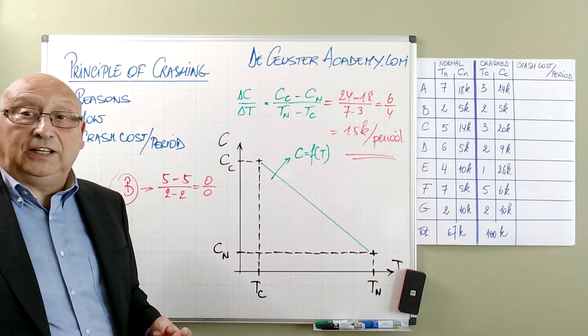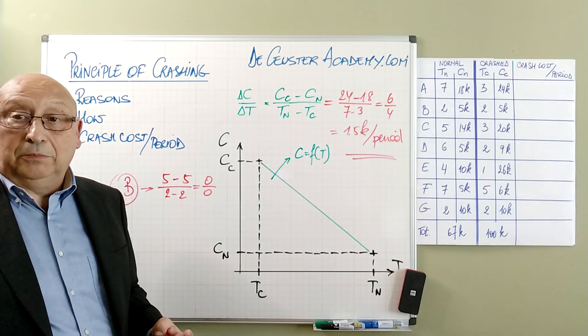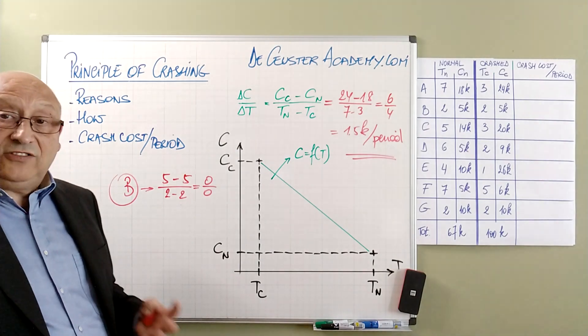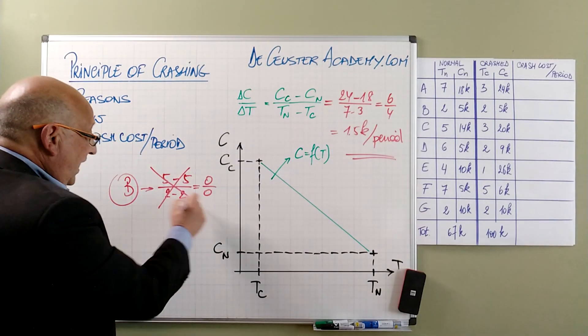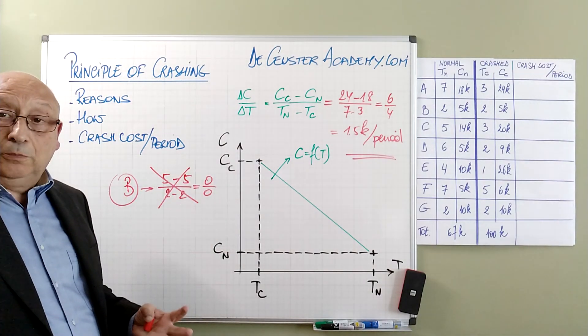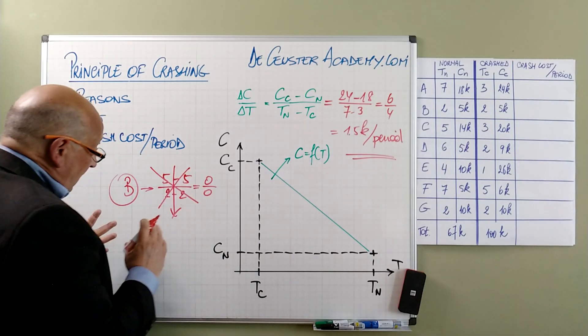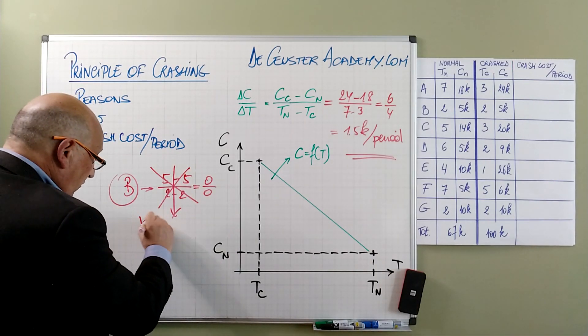Now we know from mathematics that we cannot divide by 0, and that 0 divided by 0 is indeterminate. This basically means we cannot crash B. It's not possible to crash B, so we have to take that into account.